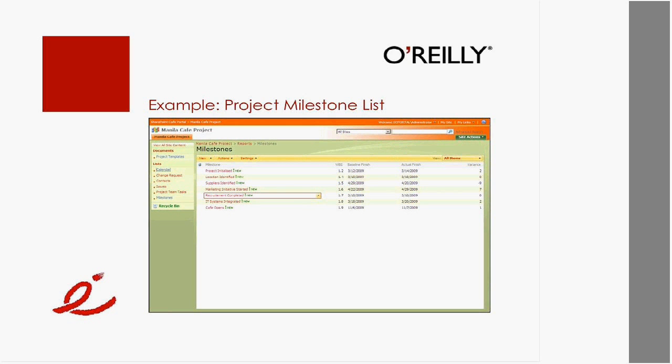So those numbers will tell me how ahead or how behind I am, right? In the third example, it's -9. That means I'm actually 9 days ahead. So that's a good thing. And that's how I define the variance column.